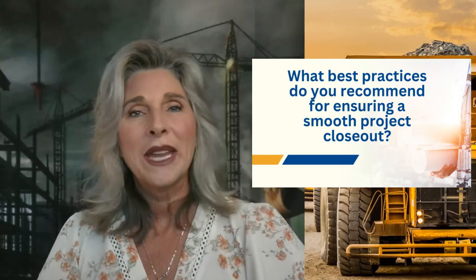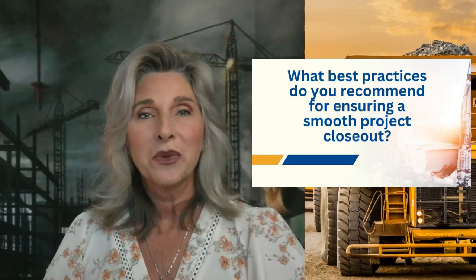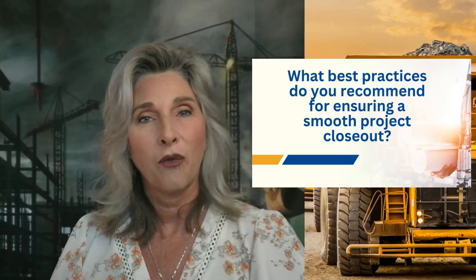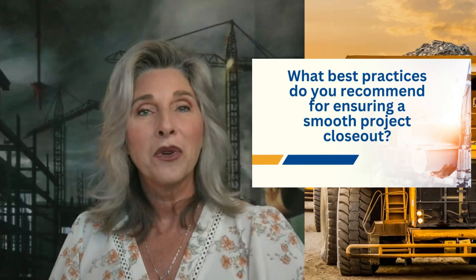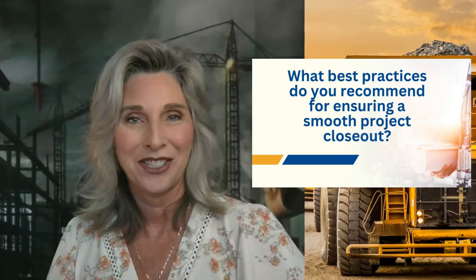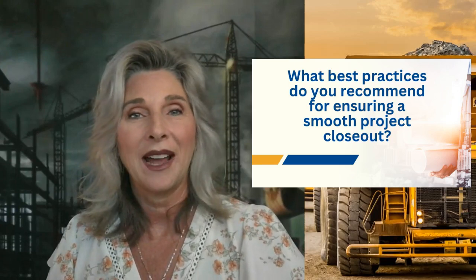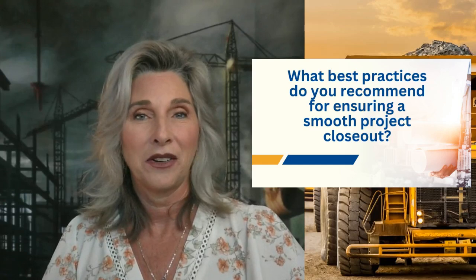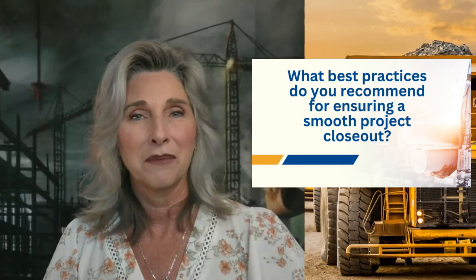In the project closeout, we can expect things like the turnover of spare parts that need to happen. And so again, going through the specifications and going through those quality control sections and pulling out the requirements of what is going to be end deliverables expected at the end of the project for the owner or client, we can pull those out and create a list so that we have something to work through as we're going through the entire project. So knowing upfront what the spare parts are going to be is going to be important for the contractor, because they're going to have to order that surplus amount in their calculation when they're bringing on those materials to the job site. And so this way they don't have to go out and order extra after the work has already been completed and done.